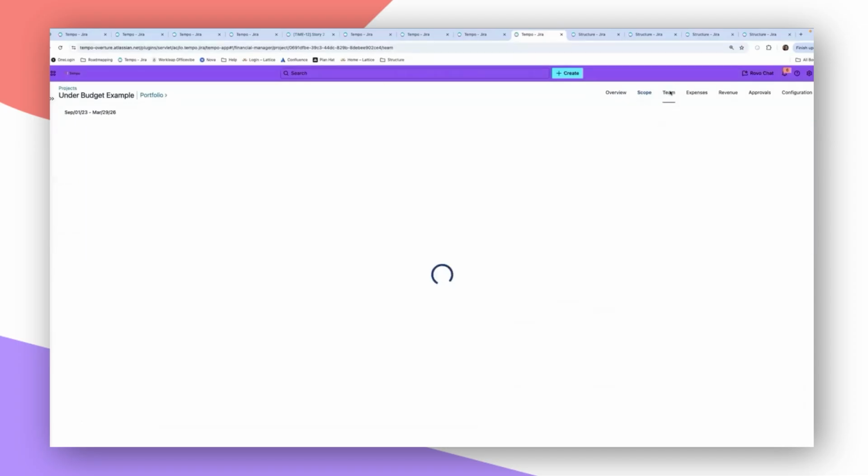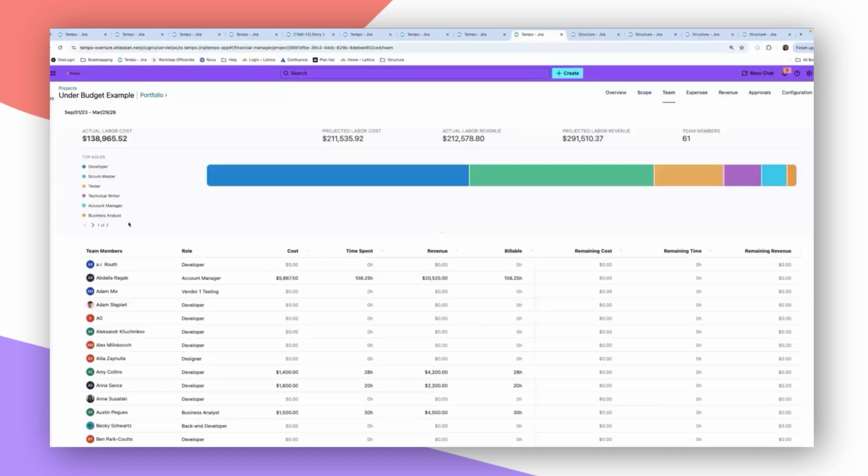In this team tab, this is where we connect back to Capacity Planner. All the teams that you've been planning capacity for appear here with their cost rates. So when a team is over capacity in Planner, you can come here and instantly see the dollar impact of that over allocation. It helps answer questions like, what's this team actually costing us? And is that in line with what we expected? It's not just people hours anymore, it's people hours tied to financial impact.